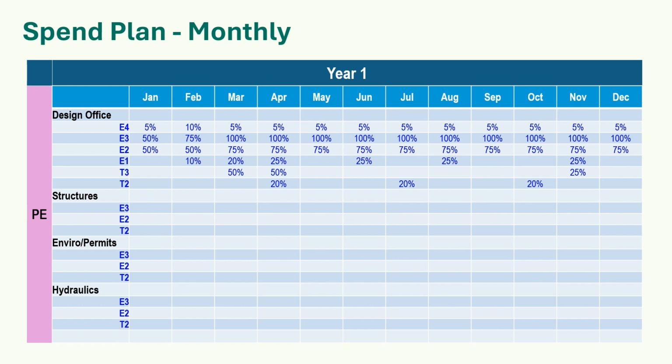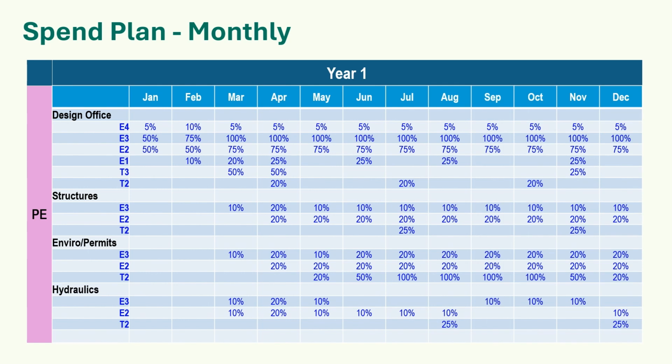Review the work breakdown structure, WBS, to help identify many of the work elements of your project. Then work on the other specialty groups. Be sure to discuss this with a senior member of those specialty groups and subject matter experts to make sure they agree with these estimates. You will eventually document a scope, set of deliverables, schedule, and a budget with each of them. See the WSDOT Project Management Guide website for more links to scoping with specialty groups and SMEs.